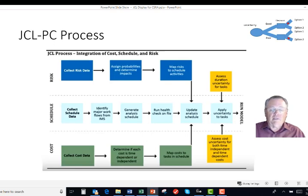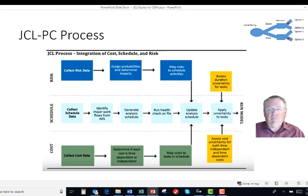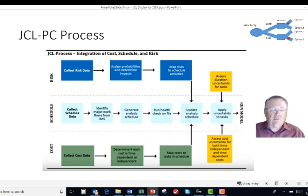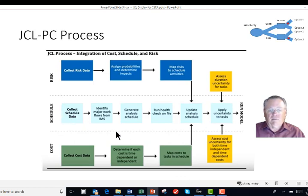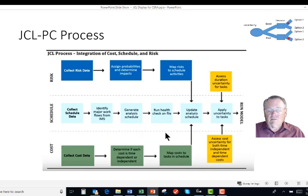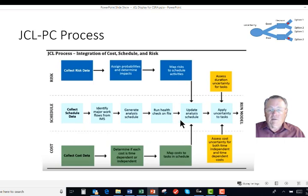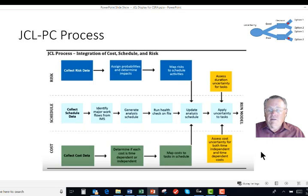The JCL practice, as published, is really not much different from what I would call the typical cost schedule risk analysis. You collect data, identify the workflows, generate some analysis, check it out, look at the health check on file, update the analysis with the schedule, apply uncertainties, and then run your model.